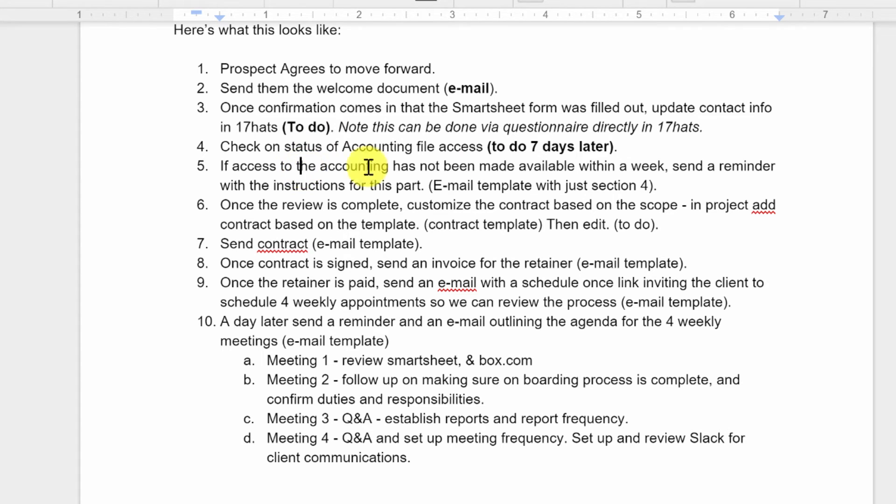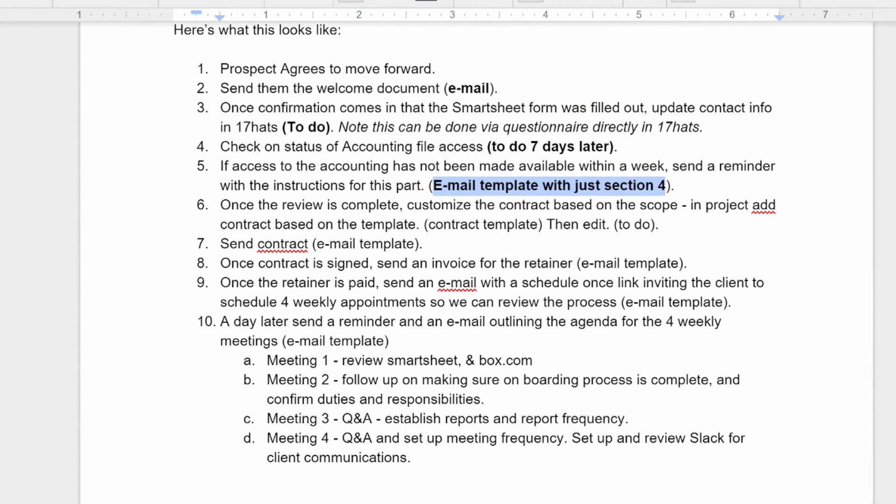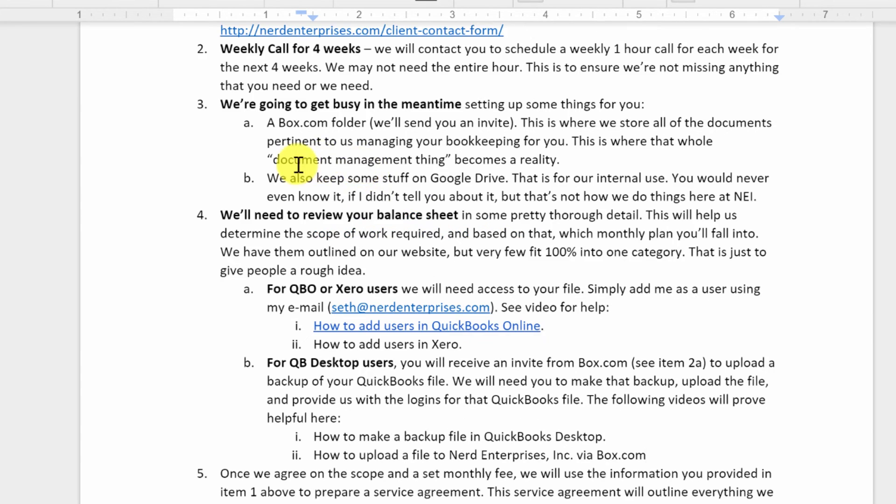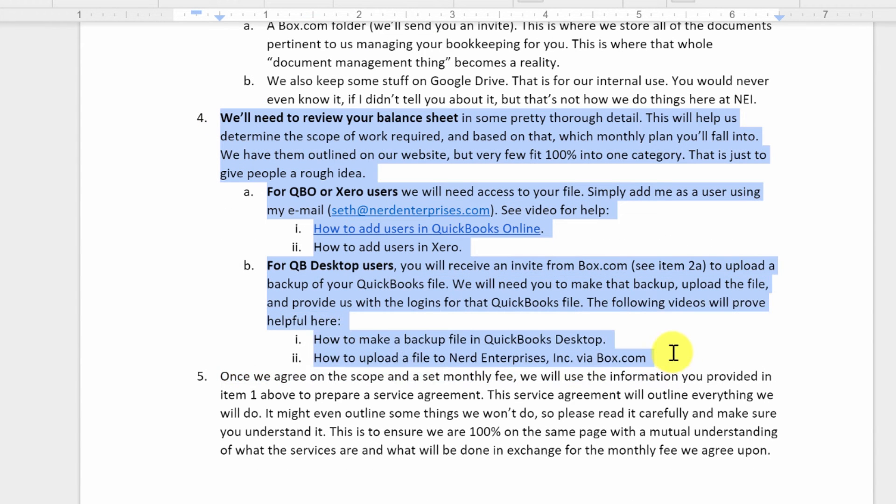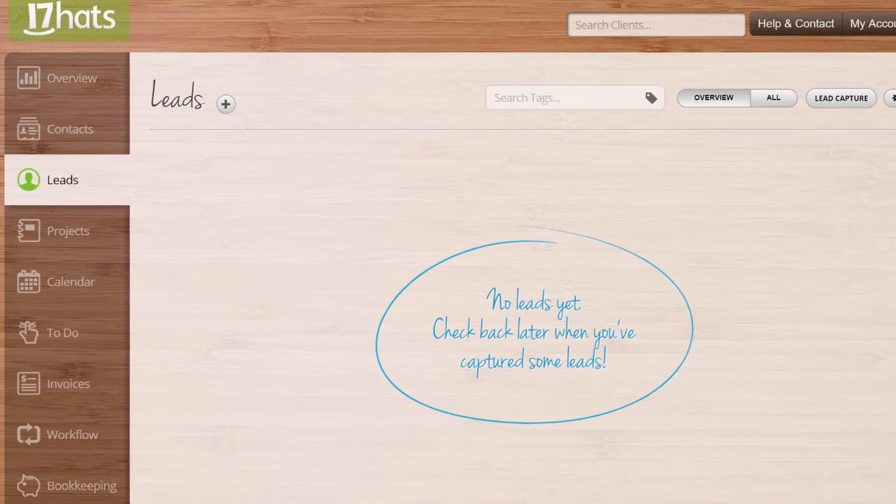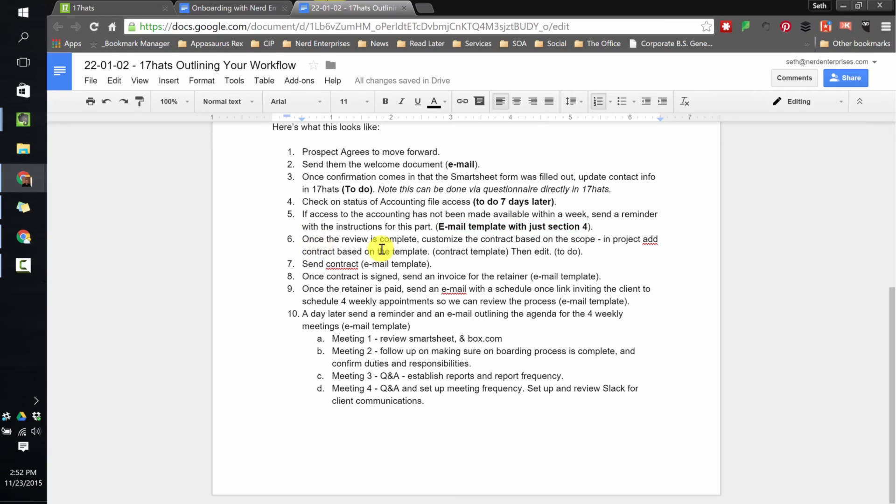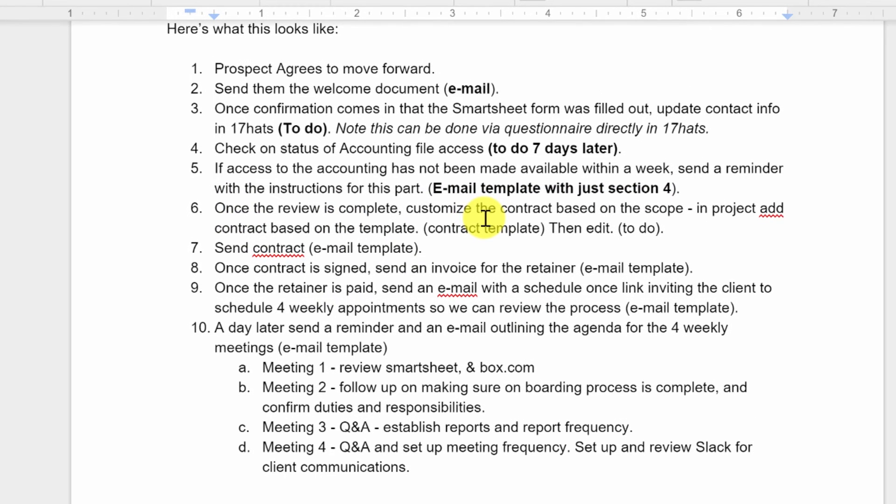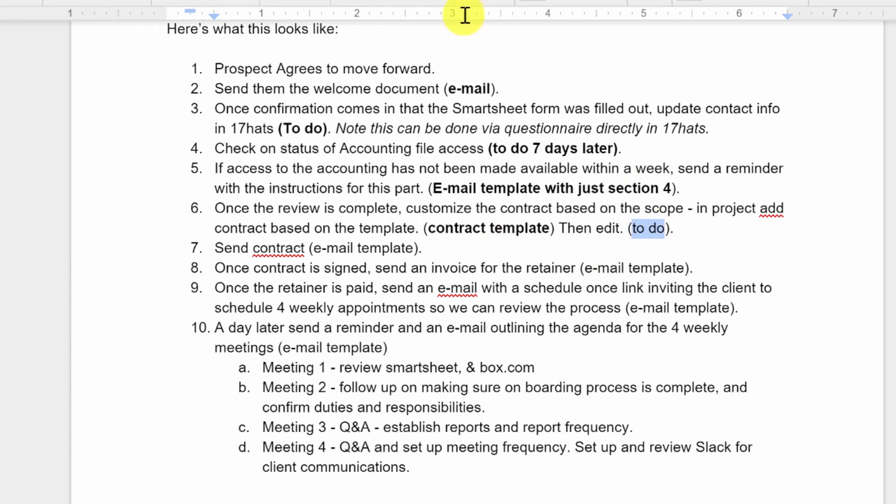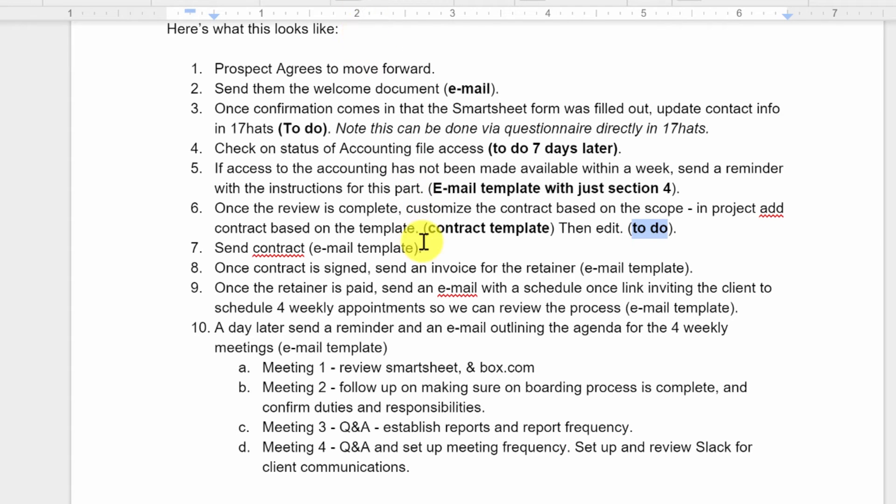Next, if access to the accounting has not been made available within a week, we'll send a reminder. So if I haven't checked this off within seven days, then we're going to send an email template with a reminder. So it means I need an email template with just section four, which is this whole section here saying, hey, don't forget we need access to your file so we can do the review and then get back to you with a contract. Once the review is complete, we'll customize the contract based on scope. So you're going to see we need a contract template. And then we also need a to-do in terms of the fact that we have to edit that contract. And you'll see it's really cool how the contracts work in 17 hats. We can create the template, then go into the project, add a contract based on that template, and then customize it because once we've done the review of the books, this is how I do things, we're going to add in specific line items that describe what's going to be kept up to date on a month-to-month basis. And it's basically stuff that I'm pulling right off the balance sheet after reviewing their books to determine, is there accounts receivable? If there is, this is what we're going to do for that and so on and so forth. So I literally define the scope based on the balance sheet. And that, of course, comes right out of the review that we're doing.